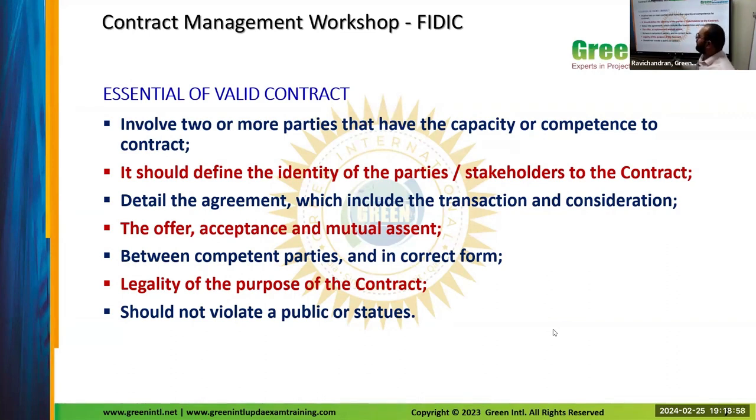It should be between competent parties and in correct form. When we say competent parties, they should have the authority to enter into a contract, they should be mentally sound, and they should be competent enough to enter into a contract. And it should not violate public policy or statutes. As I told you earlier, there are laws from the government related to constitutional or regulatory matters.